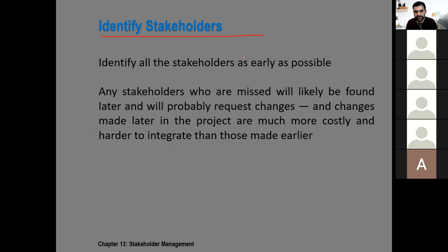Stakeholder identification: if you do not identify them early, and later a stakeholder or a group of stakeholders is found, then what would happen? There are chances that they may ask for change requests. If change requests come late in the project, they will be much more expensive as compared to change requests early in the project.